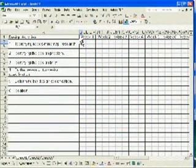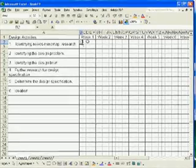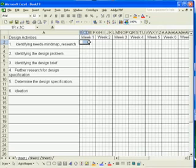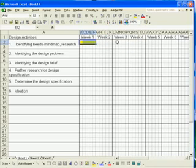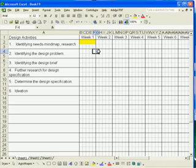The duration taken for each activity is indicated by shading the cells. Remember, each cell represents one day. Think carefully of the number of days needed for each activity. To add shades to the cell, select the number of cells required. Click on the drop-down option of the Fill Color button. Select the preferred color. Repeat the steps again for the rest of the activities.